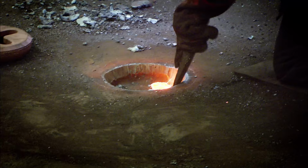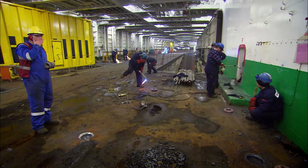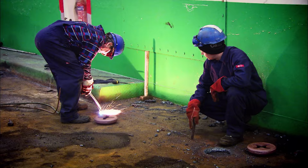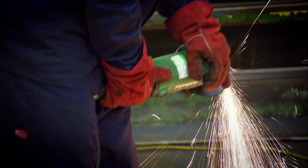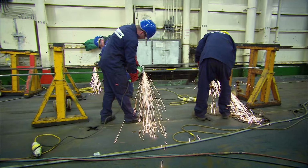You've got to remember this 18, 20 tons travelling back and forth on trailers and stuff. If it goes below a certain millimetre, it has to be replaced. To replace all that is a massive job. To strip out the old decking would take months, so engineers will be fixing a new level of steel above the old one, saving time and money.